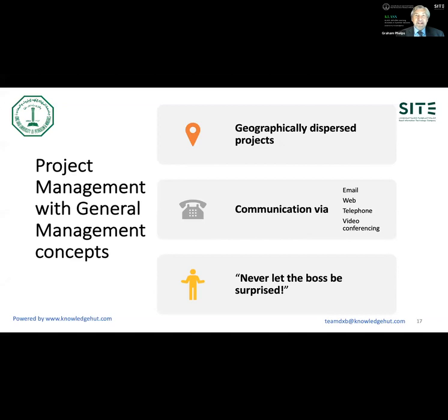And by the way, I would definitely recommend this as an activity whenever you run a project, whether you're leading or following. Suggest that somebody somewhere runs a discussion around what does a good project look like. List all their ideas and then put them in order of priority. So this is what we did. What does a good project look like? And we put all these things down, things like keeping to budget, hitting the deadlines, staying in touch, communication.